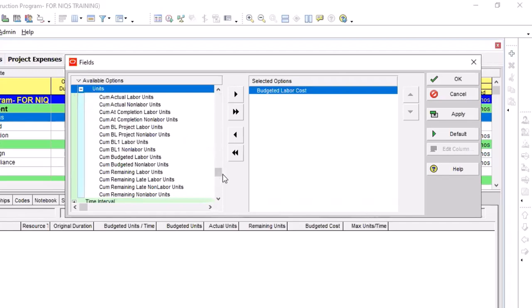For your monthly spread for your costs, you don't want to do cumulative. You might want to do cumulative when you're doing your overall report, but when you're doing your cost monitoring, cost control, you want to look at every month on its own merit. What did we plan to spend this month and what have we spent in our actuals?